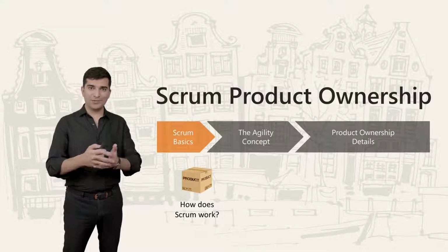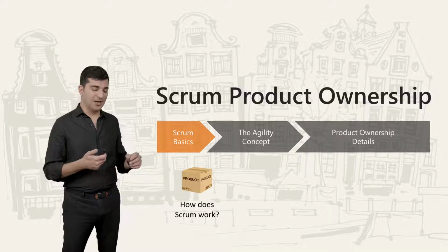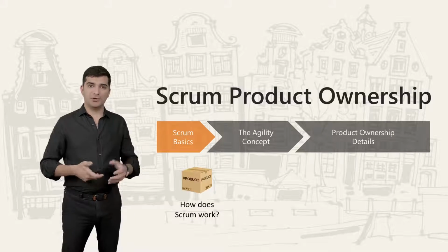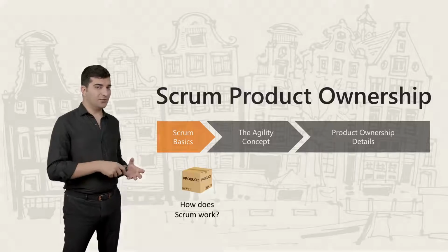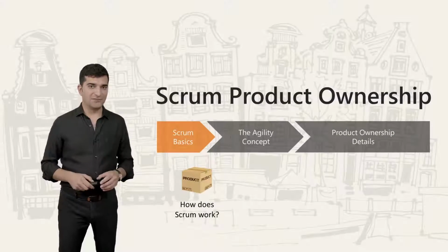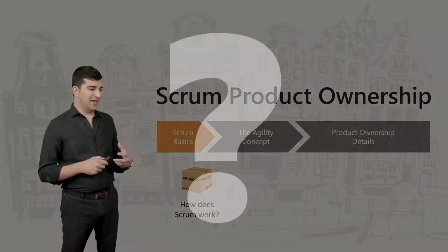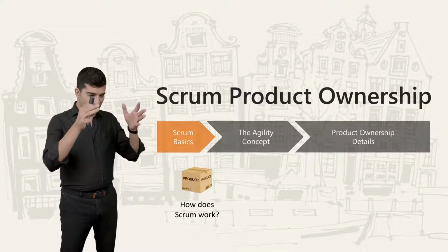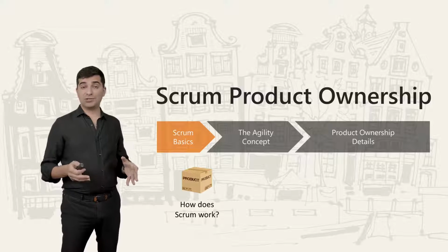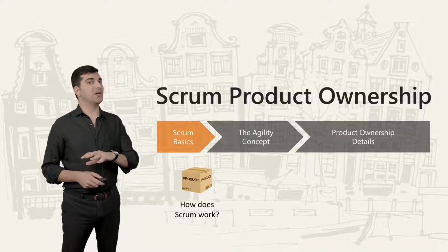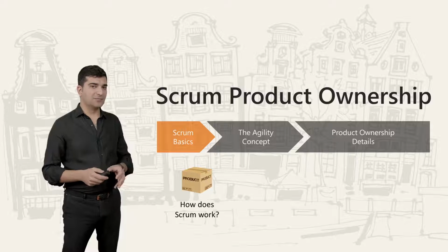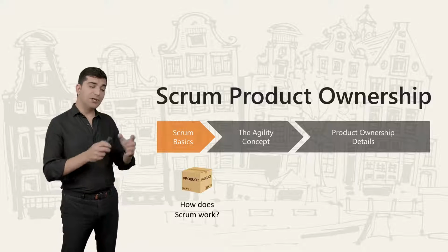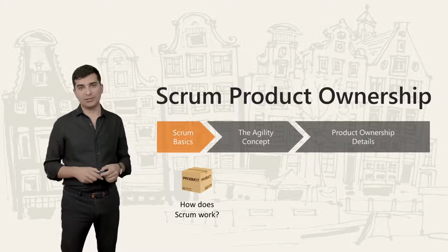All right, so you're going to start a new project. You're the product owner. And the first thing that you did was to think about the reason why you are doing the project. And where did you document it? In the product vision. What did you do next? You created a very simple version of the product backlog, which is an ordered list of the features that you're going to have in the project. And you only spend a few days, create a few items. You don't try to create a complete product backlog. When you do that, then you are ready to start the project.